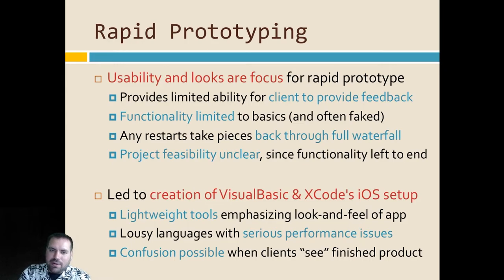Very often you'll have that first delivery to the client, what we'll call a sprint with Scrum. You go to the end of that first sprint, you deliver the software to the client, you demo it to them, they look at it and they say, oh, wait, I didn't think this is what we were talking about. Can we change this and that, and add these features?